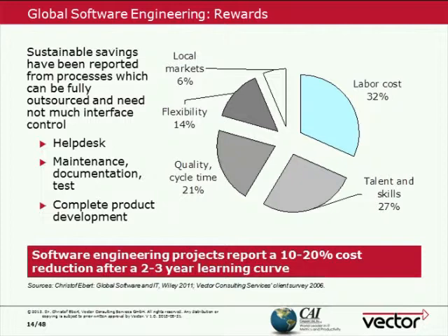The number you should remember, except for these cancellation rates, is what you could realistically achieve in global software engineering. And I'm here not talking about outsourcing of a specific service, which is certainly a different ballpark than global software engineering projects or distributed projects. So we're talking about distributed engineering projects. And in these distributed IT or software projects, the gain which you can reach in a sustainable or established process is typically in the neighborhood of 20, something beyond 20%.